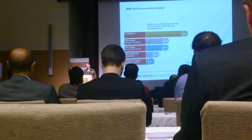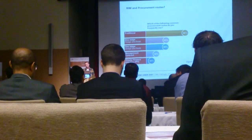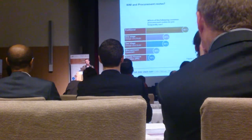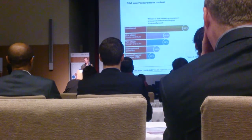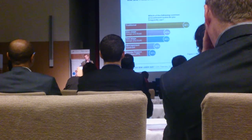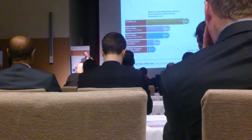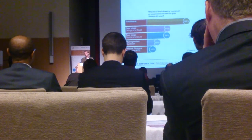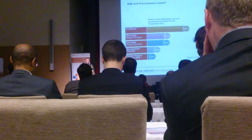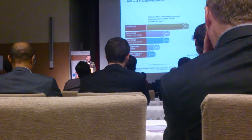Why have we got such good adoption of BIM in the UK? I would suggest BIM had a big hand to play there, but a lot of it was down to the procurement route — private finance initiatives, PFI hospitals, Building Schools for the Future. These were large projects over three or four years requiring multiple design teams. The client wanted to de-risk the process. Contractors embraced it. If you were on phase one of a project, the team assembled, got used to BIM, learned the protocols, and by phase three the designers exceeded the expectations of the contractors.